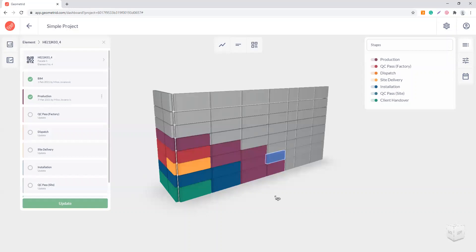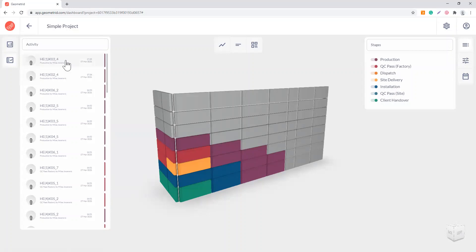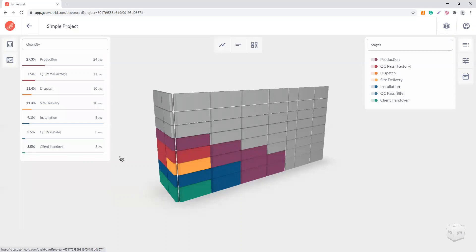Another thing is the activities. You would see here once someone has updated, all the activities are going to be represented here for every single element that's updated. We'll write down which element is updated at which stage, by whom, and the exact time and date when this update is done. These things would then enable us to filter the model based on the activity dates as well as some model properties or element properties that we have inherited from the IFC file that is uploaded.